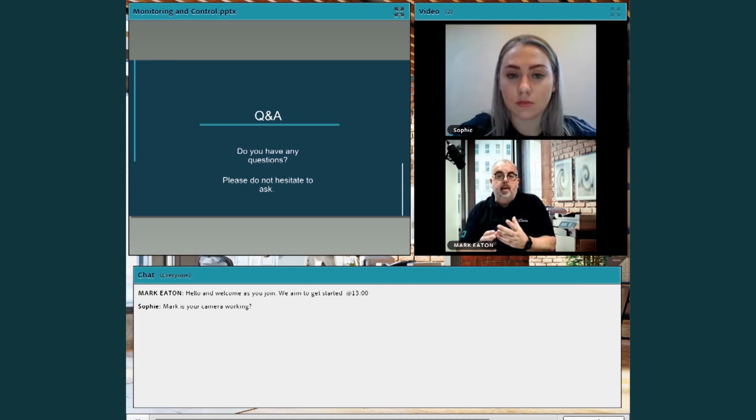Traditionally, we always used to look at fixing and flexing three things: time, cost, and quality. There's actually three more things that you can flex. Risk: you can choose to take more risk than you've decided to at the start, or vice versa, less.